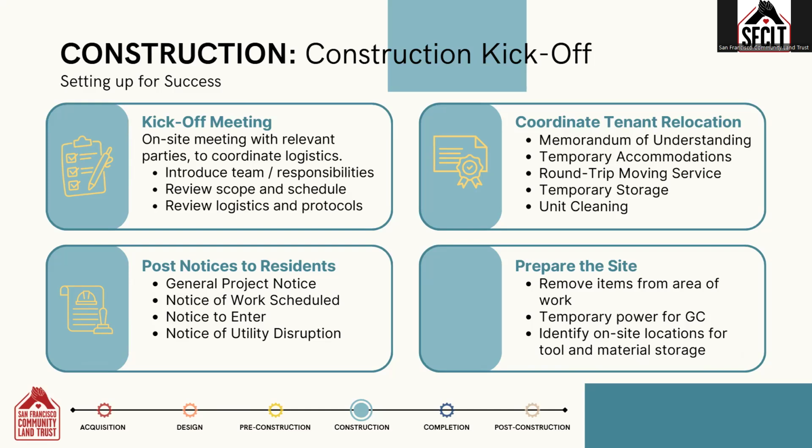In addition to the kickoff meeting, the construction manager will coordinate with property management to post notices to the residents. If any tenant relocation is required before construction starts, that coordination may happen now. The sponsor may engage a relocation consultant to manage the logistics, but the construction manager will need to coordinate with them on the move-out date and provide progress updates along the way.